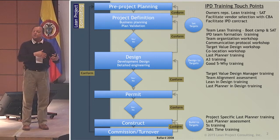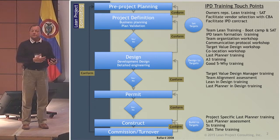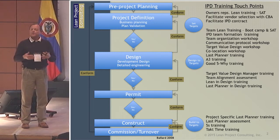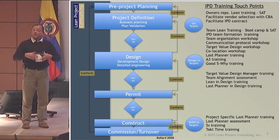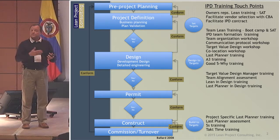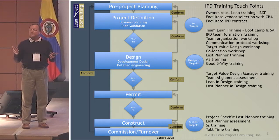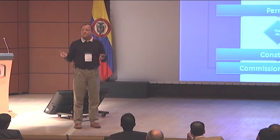The architect does what they've traditionally done — they become the translator of the owner's value proposition in the context of the construction world. They go into what constitutes design: SDs, DDs, schematic designs, design development, and then construction documents. In the case of the Cathedral Hill Hospital in downtown San Francisco, a $1.8 billion project, they did exactly that, and it was a $43 million feasibility study.